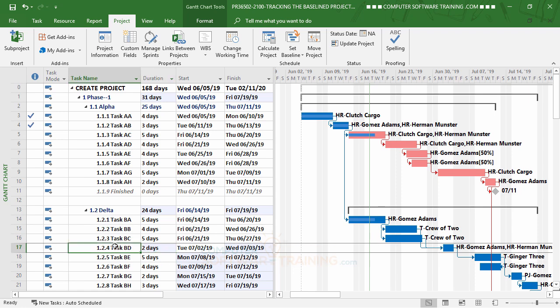So we made that into 2 days, but the problem is we pulled it back, but there's a weekend here, or a holiday, that it couldn't go back to. So because that couldn't pull back, nothing else could pull back. So I kind of wasted my shot there. But I'm going to leave it, just to kind of get that going.